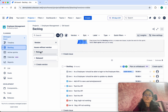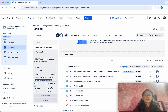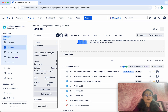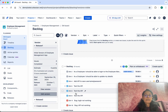Now in the version panel we are able to see two releases — Release 1 and Release 2. This gives the description and shows how many issues are associated, how many are completed, the story points, and the start and end dates. If you want to edit the version you can do that — you can update the release date and other details.